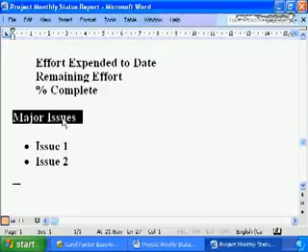Now, many of the problems and issues and warnings that are going to be provided to you by your team members are problems, issues, and warnings that you can deal with yourself within the confines and powers that you have as a project manager. You need to only be making senior management aware of specific issues that are beyond your power, beyond your authority to deal with as the project manager.